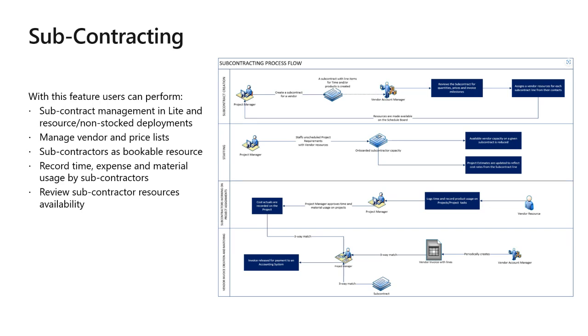But obviously, for resourcing the projects, we've now also added the ability to have those dimensions of subcontract and subcontract line appear on your schedule board and your schedule assistant, so that for a particular generic resource requirement, you are able to find an appropriate resource, which could be any resource, or it could be for a specific subcontract, or it could be a particular subcontract resource.